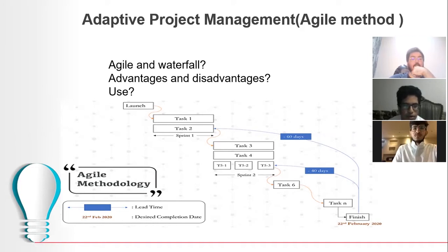A project is divided into separate smaller chunks, or collaborative teams are divided to work on sprints separately. At the end of the sprint, they come together to discuss their progress and to work out issues collaboratively. Testing is also carried out at the end of each sprint, rather than at the end of the project, as you said before in the Waterfall, to ensure that fixes are made right away.